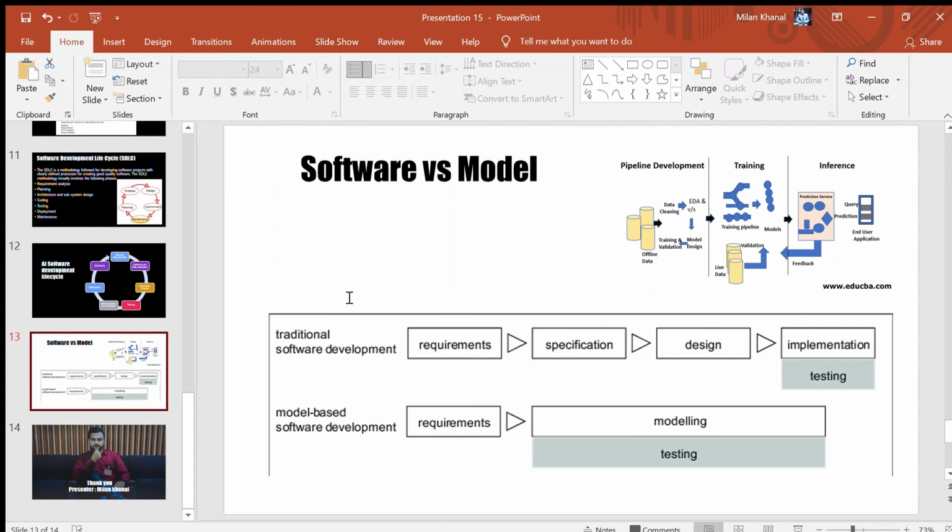So to summarize, it can take much longer to build the right data infrastructure and prepare the data to be used than building the machine learning model to run on the data. This is a big consideration for project managers as they manage a team and think about AI scope and project estimates.